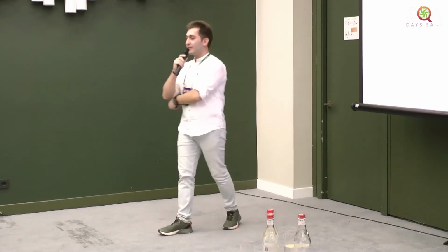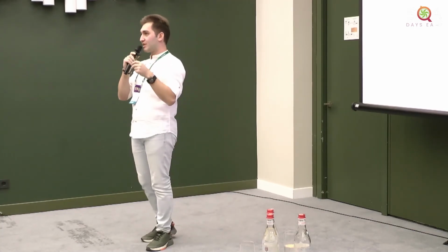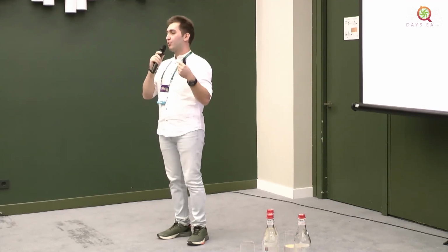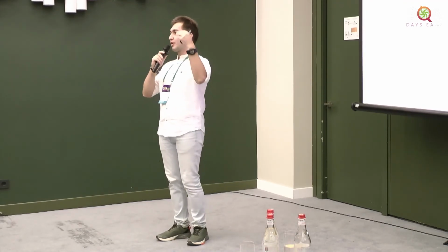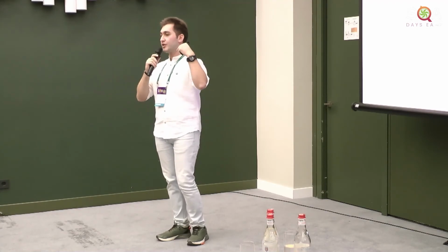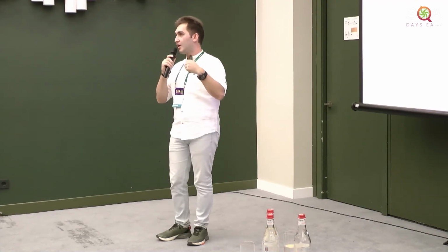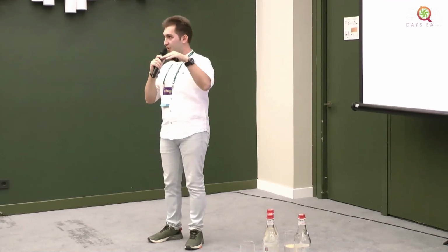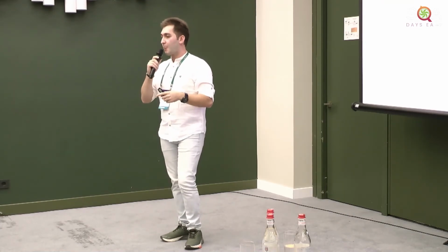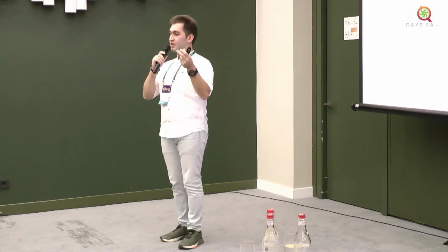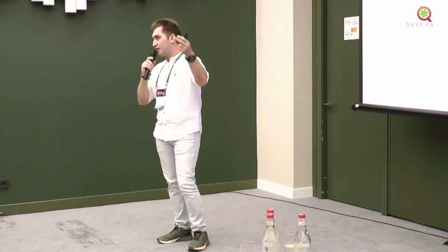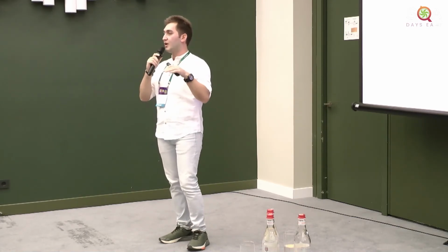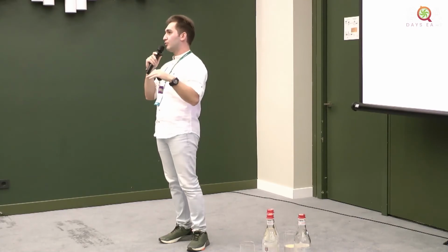Okay, thanks for the question. First, when we started the limitation process, we took the current number of bugs in the components, and we set a limit to reduce the limitation after each sprint by 10%. But we need to do it until some number. In our case, we took the components by platforms. For example, the monetization team's platform is Android or iOS, and for each team the number was set to 10.